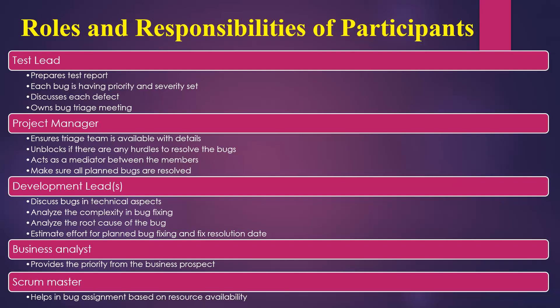The project manager ensures the triage team is available with all the required details. They unblock any hurdles preventing bugs from being resolved and manage resources — enabling team members or bringing in new resources if the current team is busy, so bugs can be fixed and tested quickly within the timeline. The project manager also acts as a mediator between members and ensures all planned bugs are resolved by the committed dates.